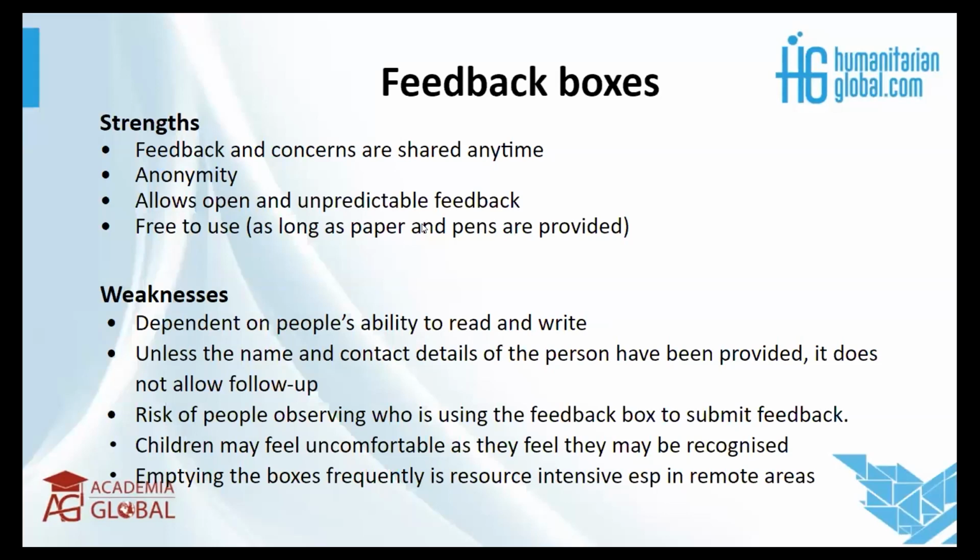And then also remember the reading and writing of the staff member. It depends on the language that it's written in. Something could be lost again in translation if it's a different language that they may not be familiar with. They may also not really understand the gravity of the situation from how it's expressed on paper. Then secondly, unless the name and contact details are written, it's difficult to have a personal follow-up on these issues. Of course, we say that it's an anonymous way to provide feedback, but it would be good to always have the follow-up in person with the person who has given the feedback, but this is not always possible.